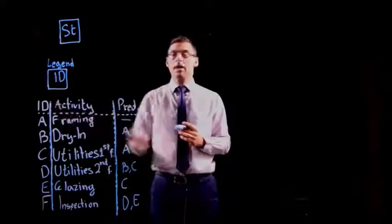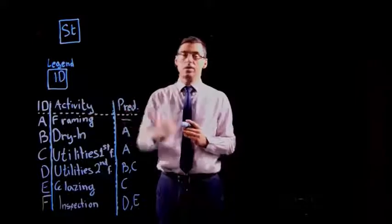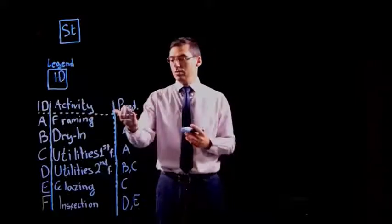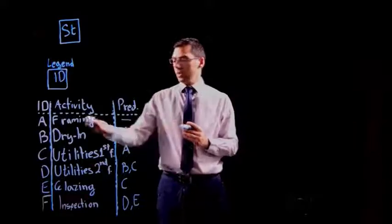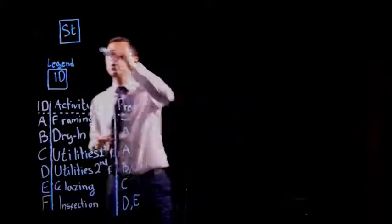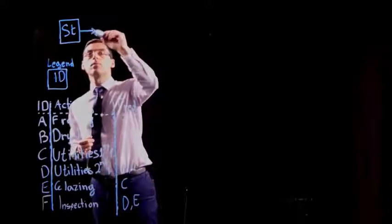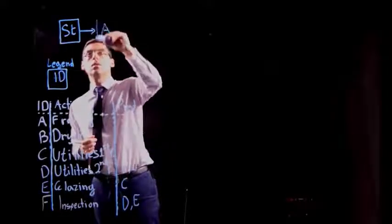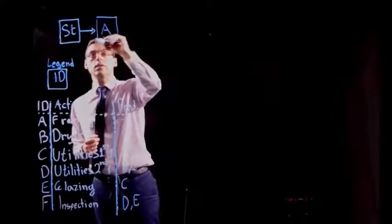In the table we see the ID of the activities, the activities themselves, the names, and here you see the predecessors. So activity A doesn't have any predecessors and it can be put into the network. There you go. That's activity A.